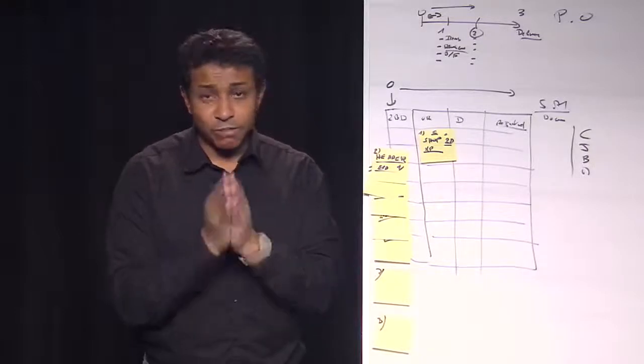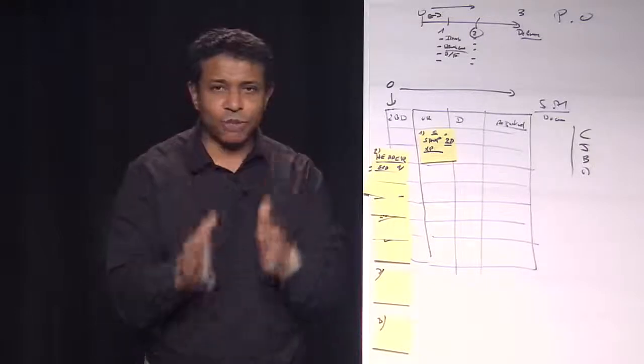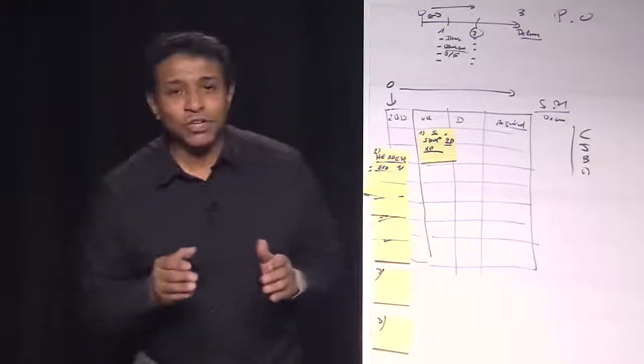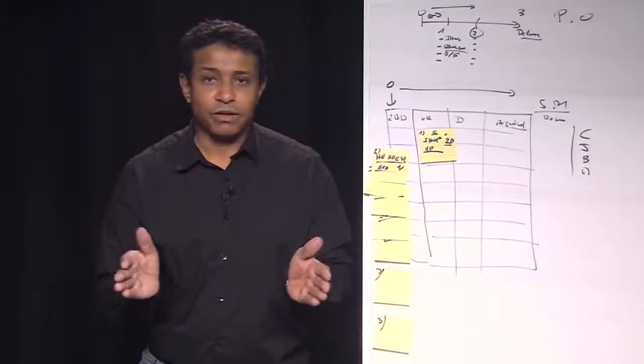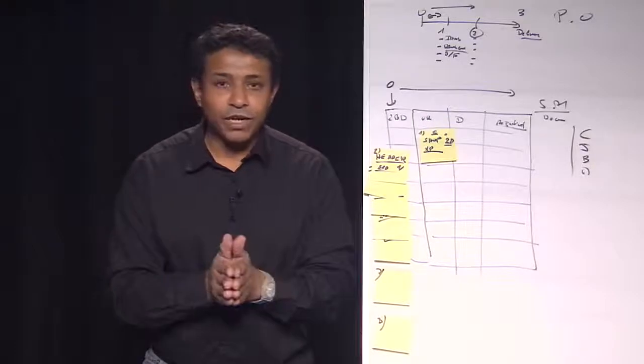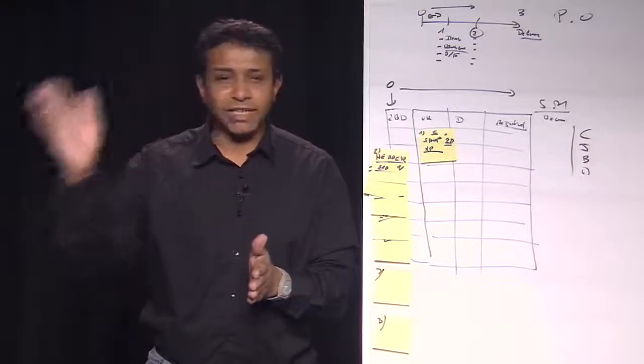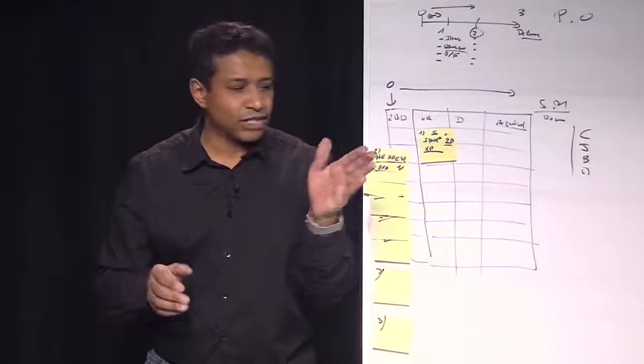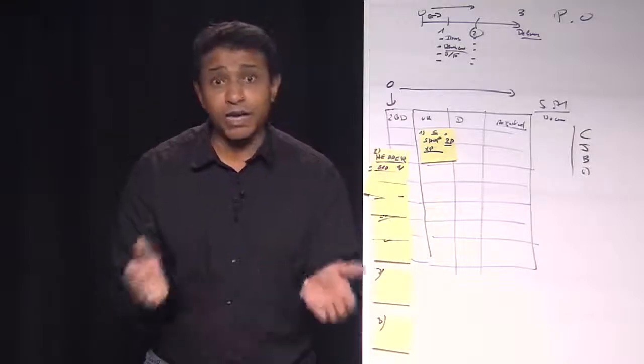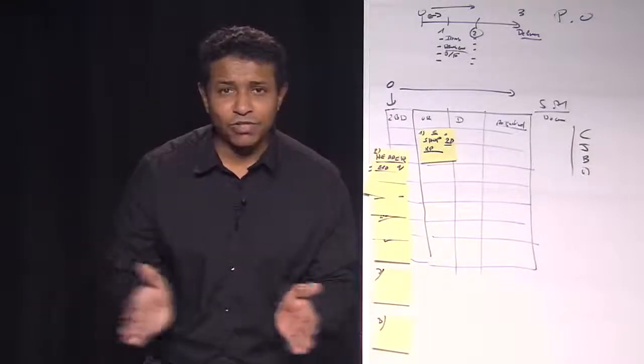If it's not, this is a major issue. And he has to tell the Scrum Master, okay, you've estimated a charge of 3 days, but buddy, I'm not free. I have to do TMA or maintenance, or some other things, or I won't be here because it's a bank holiday or stuff like that.